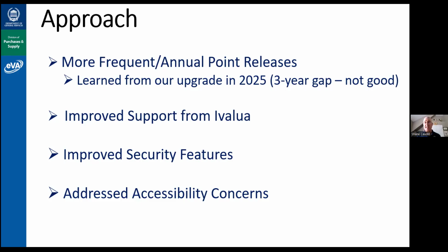And then at the end of that, when we went live with 180 back in March of 2025, we had environment issues and eVA was down. It took us about a week or two to get it tuned and running properly. It was just a very painful experience. So we're looking to shorten that threshold and do more frequent point release updates.